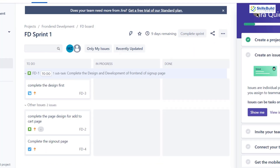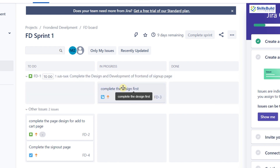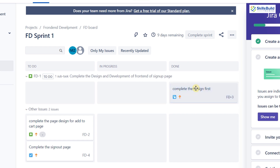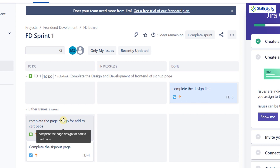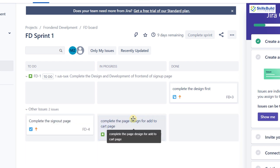I'll close this panel. We have successfully added our task and stories into our sprint. They are under the 'To Do' section, meaning no one has started working yet. When someone begins working on it, they will drag and drop it to the 'In Progress' section. Once the work is completed, they drag and drop it to the 'Done' section — a strikethrough line appears, indicating the work is complete. Then they move on to the next story or sub-task.